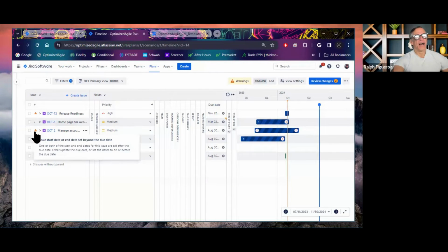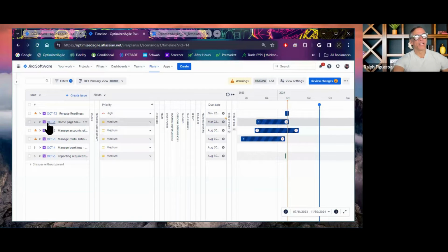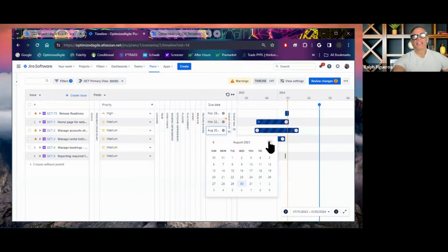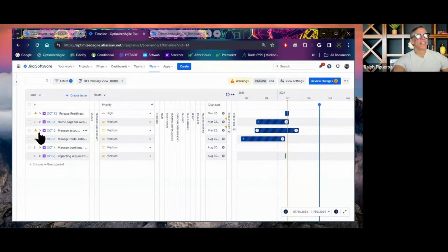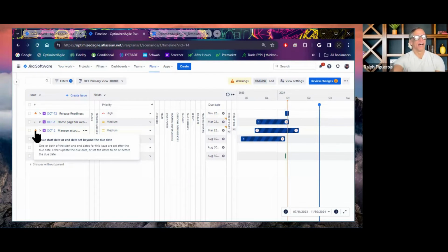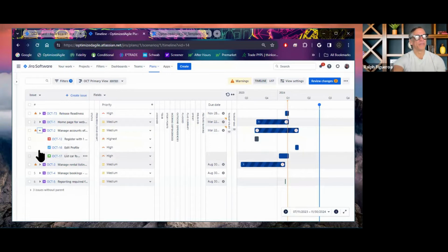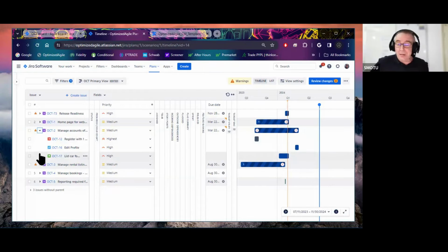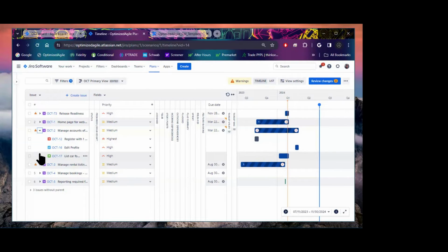And if I happen to have other issues, like in this case, this one epic was the only issue that there was. But if I clear that issue and there are other issues underneath, the triangle will persist, just to let you know, as a program manager, project manager, Scrum Master or release manager, that there are still some other issues underneath that need to be looked into. And by expanding it, you'll see the breakdown to the other issues that it is related to. Okay, I hope that answered your question, Hanu. Yeah, thank you very much.